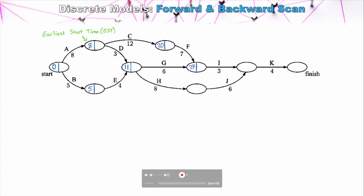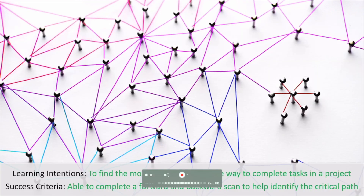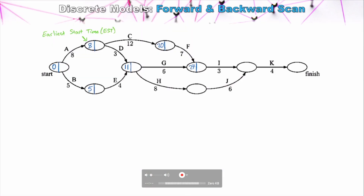So we can't start Task I until 27 units of time. Looking at the node for Tasks J: Task H can be started as early as 11 units, so we can't start Task J until Task H is completed at 19 units of time. Then for Task K, we need both I and J: J can be completed as early as 25, but I can't be completed until 30 units of time. So the earliest we can start K is at 30, and our project will be completed at 34 units of time — the minimum time for the entire project.